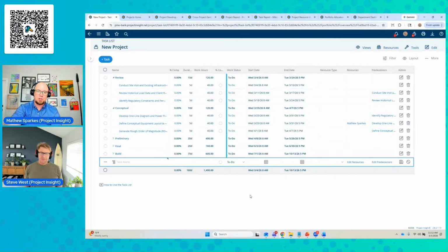Yeah, and you'll note that we preserved all the predecessor relationships. Whether there are constraints in Microsoft Project, those will be held, like start earlier than, must start on. That information is preserved in this import. That's right. And then again, that can be templatized, and you can redeploy that if you want, or you can just import and import and import and import.